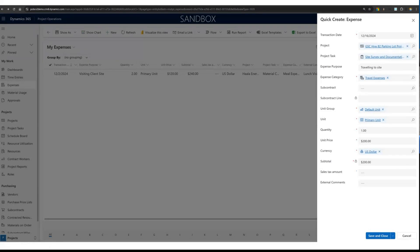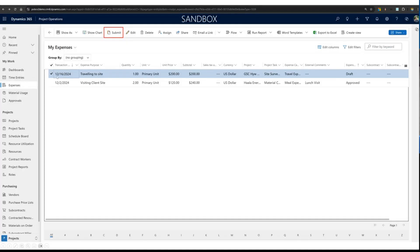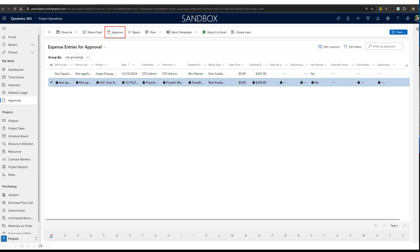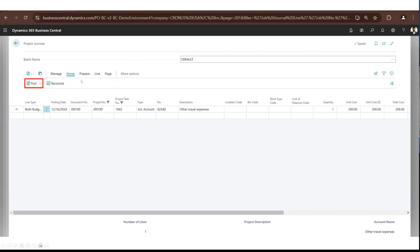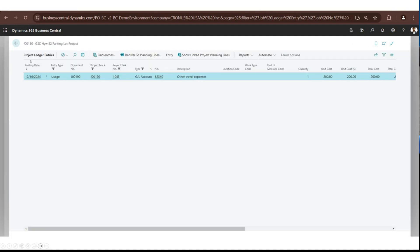Similar to time entries, you can also do expense entries. Logged in as a project manager, I want to do a site survey and travel to the site, so I add a $200 expense entry. I submit it just like a time entry, the project approver approves it, and it goes over to Business Central project journals under a GL account. The GL account mapping is part of configuration. When posted, it goes under project ledger entries as type GL account.